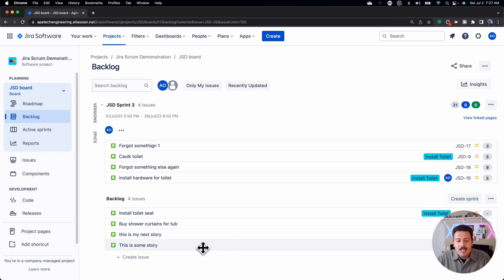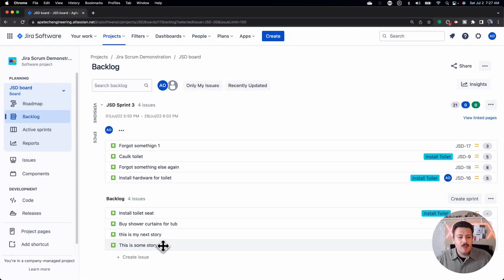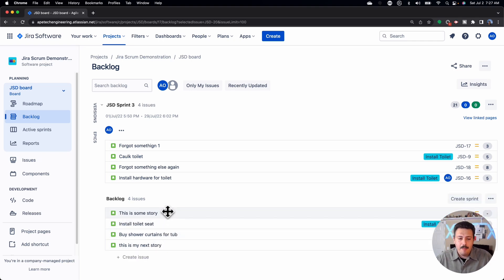This basically means that if you want to take an item that's all the way at the bottom of your backlog and say, 'Hey, that thing is very, very important and we should be working on that next or immediately as soon as possible' — in order to convey that level of urgency with your team, you can basically drag and drop it to the top.